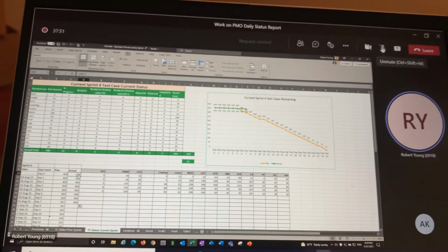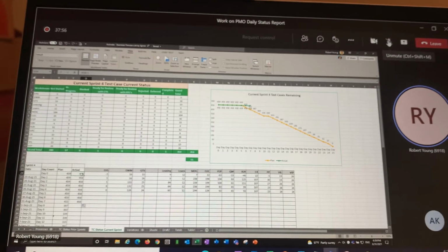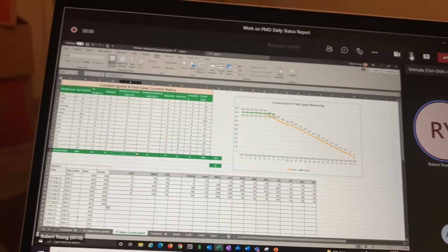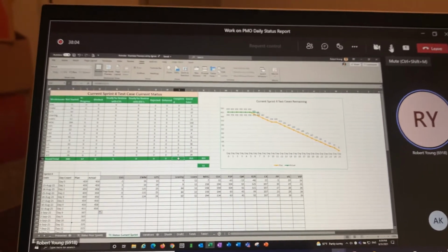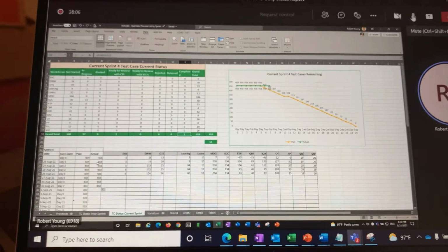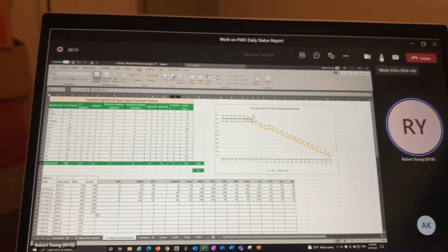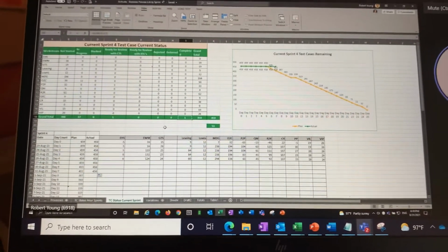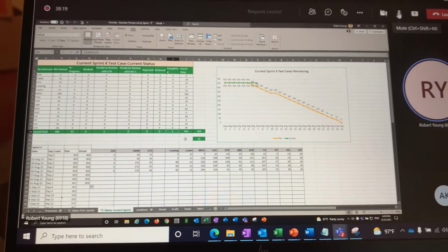So the actual that remains to be written is now 458. There are no other processes or variations with full test cases that have gone through review and updated here. So the actual number that remains to be written is still 458. Difference between grand total and completed.